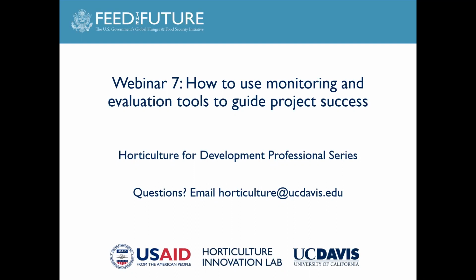Yeah, that's great. And I guess I'll just plug, I've had an experience working on conducting an impact evaluation for a project that did not do a baseline. And while it was difficult because, like you're saying, you don't have the initial information about what a situation is prior to any intervention taking place and what that change is, I think there are still ways to do that. And I think it's also more important, particularly if a project is still ongoing, to look at doing midline and endline evaluations so that at least you have points in time where you can measure some form of change.